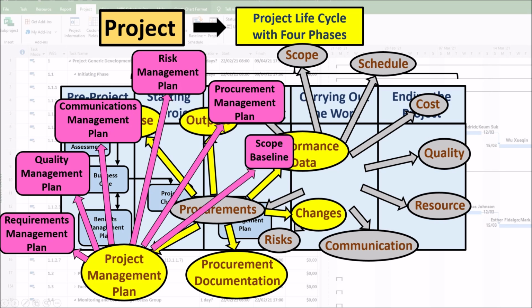6. Scope baseline. The project WBS and the deliverables documented in the scope baseline may be updated during the procurement conduct process. 7. Schedule baseline. If there are supplier-created deliverable changes that impact the overall project schedule performance, the baseline schedule may need to be updated and approved to reflect current expectations during the procurement conduct and procurement control processes. The buyer should be aware of any cascading impacts of schedule delays created by one supplier that impact other suppliers.